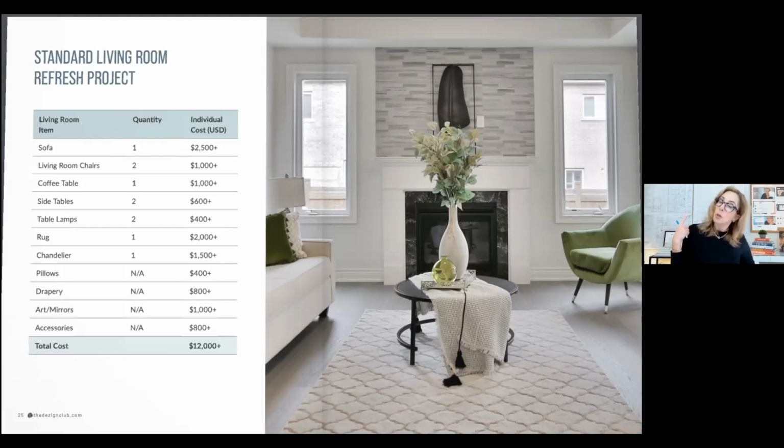Shipping. Oh, you're buying a sofa? It's going to cost to get it there to you. So you want to include the shipping and taxes, if you're including VAT or sales tax on things. Oftentimes, if you're doing any kind of construction, you're not going to have places to store things. And it may arrive, God knows it doesn't recently, but it may arrive in a place and you're not done yet to receive it. So you may need to actually have storage costs included.